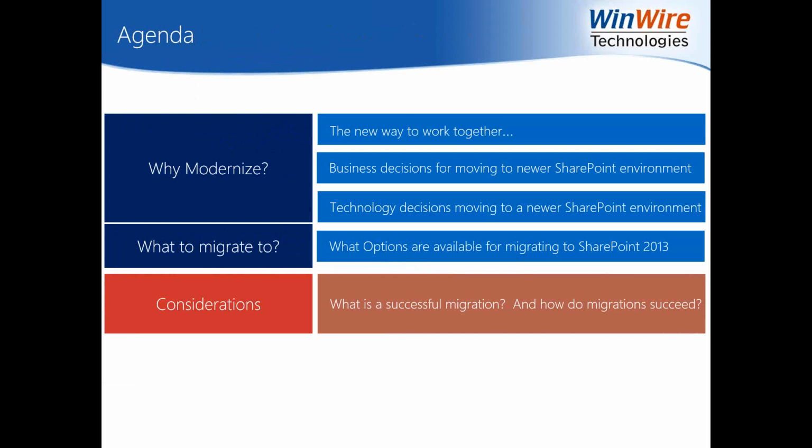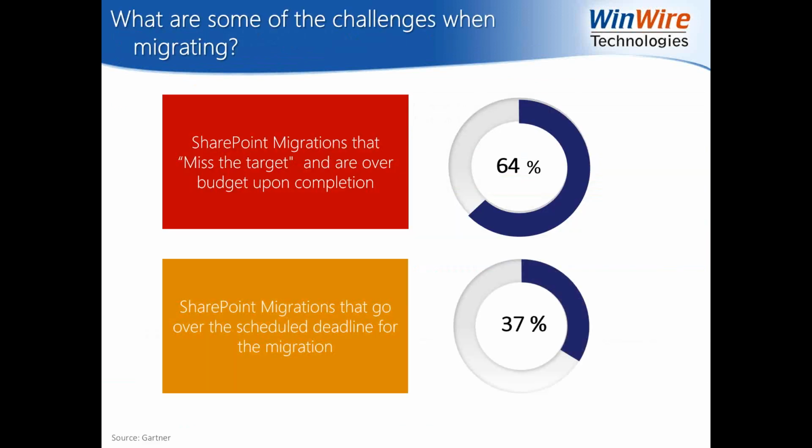A fact is that SharePoint migrations that we have run, and in our experience, this is a sad state, but it is the truth from Gartner, that 64% of migrations are over budget upon completion, and 37% miss the scheduled deadline when people are moving from an older version of SharePoint, leaving a very negative feel about the platform.